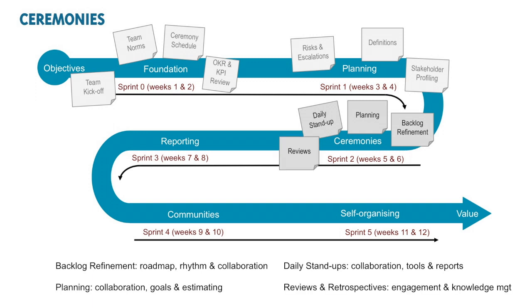Each working cycle concludes with a stakeholder review where clear and honest feedback is gathered on work achieved to date. This is then followed by a retrospective that aims to evaluate performance and to support a self-reflecting assessment of how the team can improve or share emerging good practice.